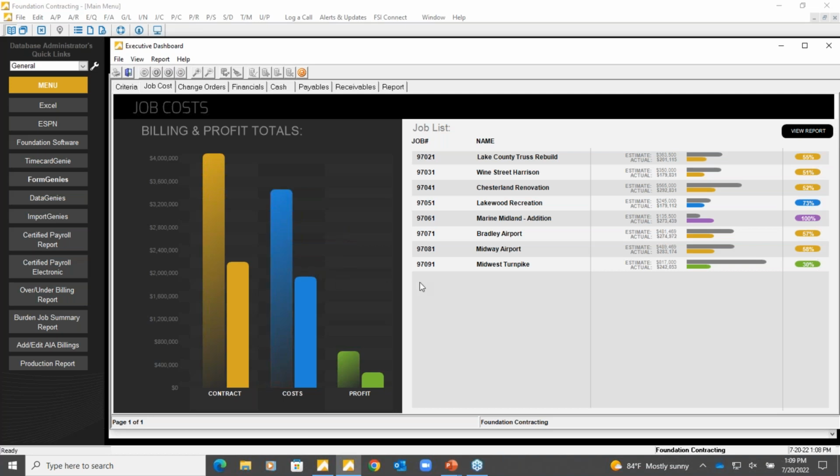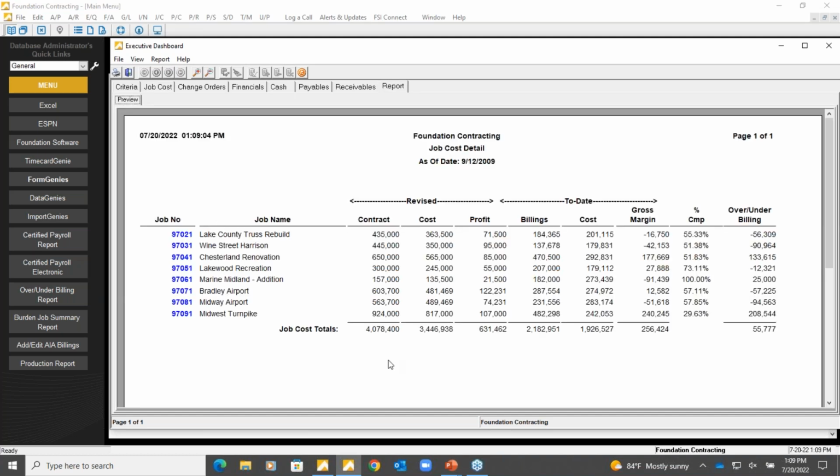And from here, to see the job cost in action, I can just drill into this graph here. Drill into a range of jobs, whether it be 10 jobs or 100 jobs, but everything I do in the system revolves around a job. So I can come in at any time, whether it be once a week, twice a day, or every other day, and everything should be accurate, real time, up to date. From here, I'm able to see what my potential profits are versus what's really going on. So as accounting is doing their thing in the system, it's getting recorded all the way down to the job so that I can see whether these jobs are actually making money or losing money in real time, as opposed to when it's too late.